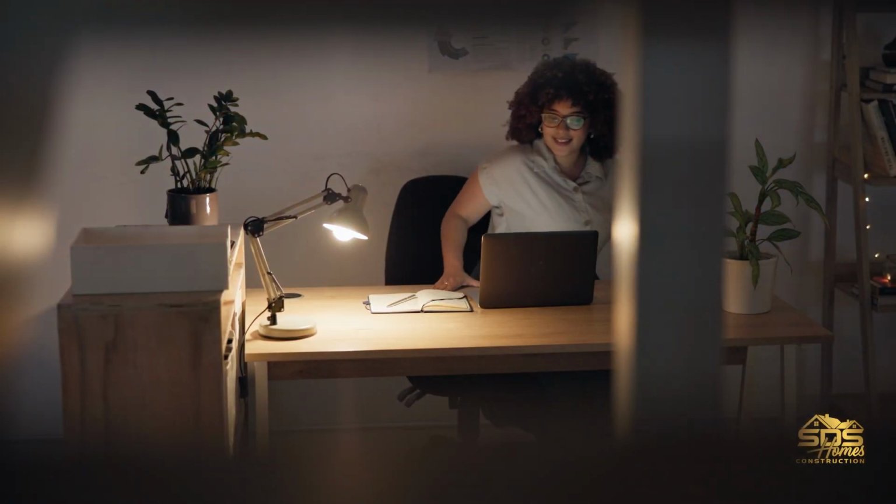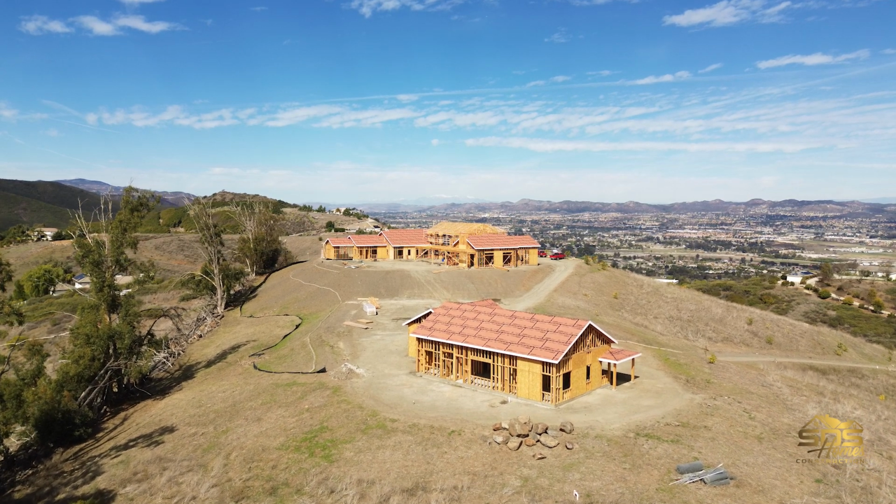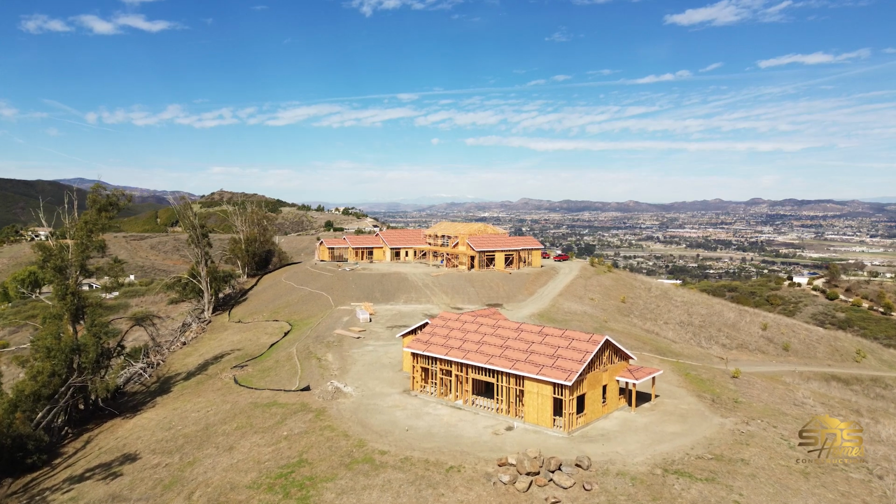And the change orders aspect of things would be like once we're getting ready to build and you decide to add something, right? An upstairs office, or you want to add an ADU onto the property, something like that would be a change order. So keep those in mind as you're budgeting for your project.